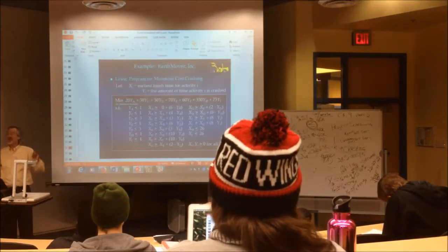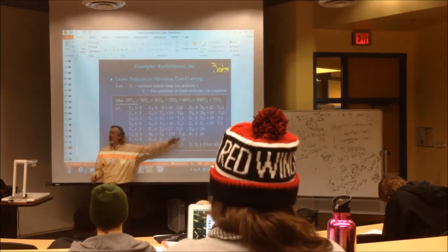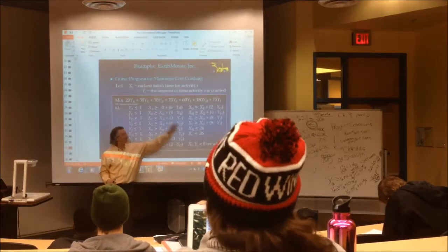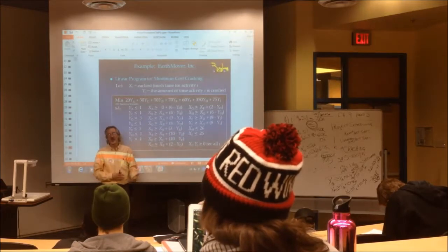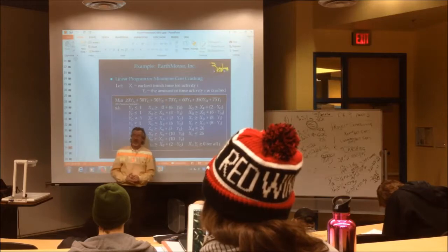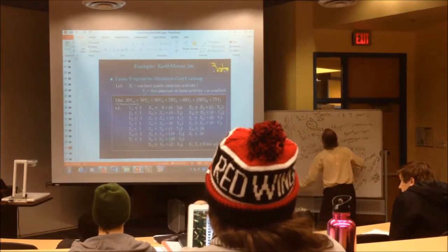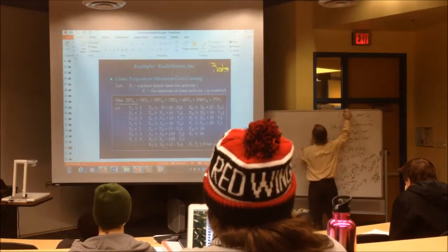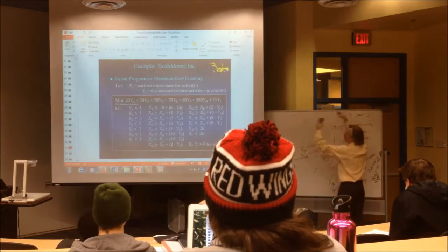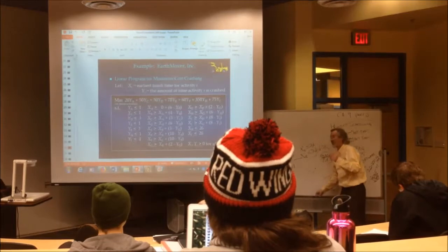Let's just keep going. These activity constraints cannot be entered into the software. It can't be solved on Excel until you get the variables from one side all on the other side. They all have to be on one side. There's only a number left on the other side. So you got to apply algebra. You ready? Let's do 2 of these. And if this were a quiz question, I wouldn't be asking you to do algebra on every one of them. I'd say now, the first 2 activity constraints, do algebra to show me what it would turn into. So let's do the first 2.